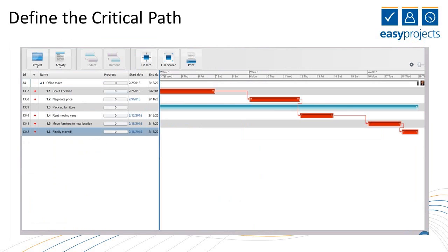Second, define a critical path. A critical path is a way to look at all activities in the Gantt chart and take into account the timing and dependent relationship of each, and calculating the longest path from start to completion of the project. This will basically show you the stuff that's critical versus tasks that can be delayed without risking making the project late. Once you calculate your critical path, highlight the tasks on it, or use a project management software to do it for you.